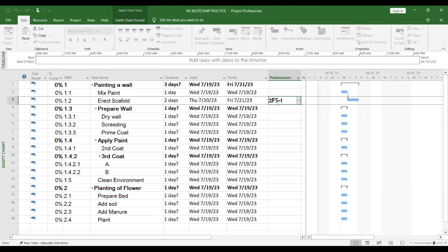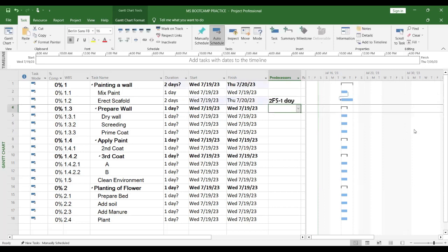Everybody, I want to press enter, but before I press enter, I want you to put your eye on the bar, the Gantt chart area, and see what is going to happen to the bar and the date. Enter. Can you see what just happened? So the bar has shifted backward, but it's still linked. So that interconnectivity between your two activities and tasks is very important, right? Now it is linked. And then your date, instead of starting on 20th and ending on 21st, is now automatically starting on 19th and ending on 20th. So you have saved what? 1 day.